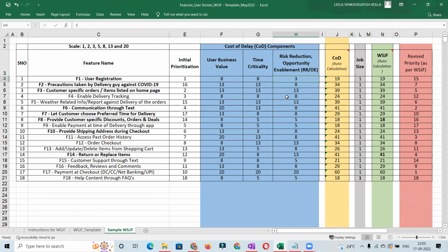Just because it has a lower weightage, the deployment of that feature might get pulled to future sprints, isn't it? It is advisable not to have multiple prioritization methods used on the same product. You either use MoSCoW or you use WSJF and stick with it.